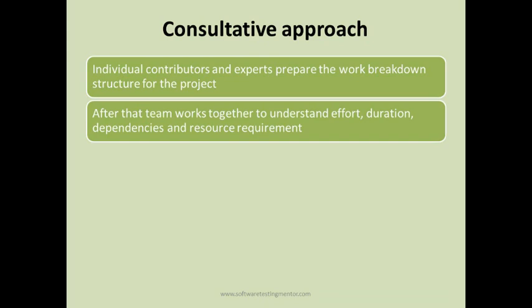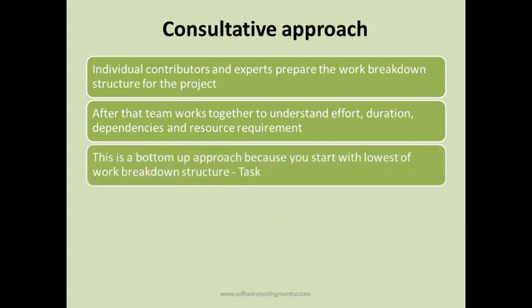Then the team works together to understand effort, duration, dependencies and resource requirements. This is a bottom-up approach, because you start with the lowest level of the work breakdown structure. For example, you have the work breakdown structure, task and subtask. You start estimating the effort required for that task and subtask, and then you add up to the higher level. So it's a bottom-up approach.